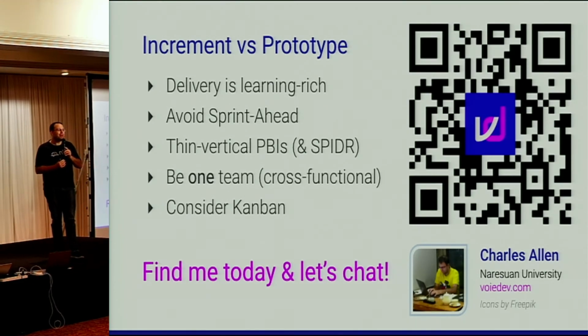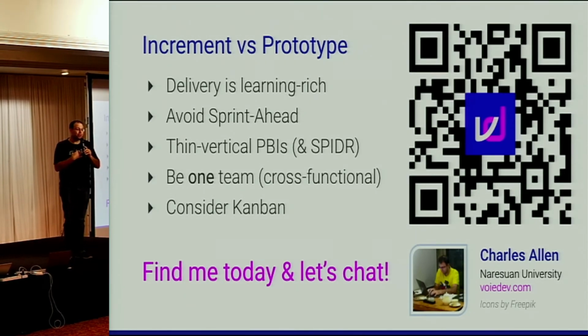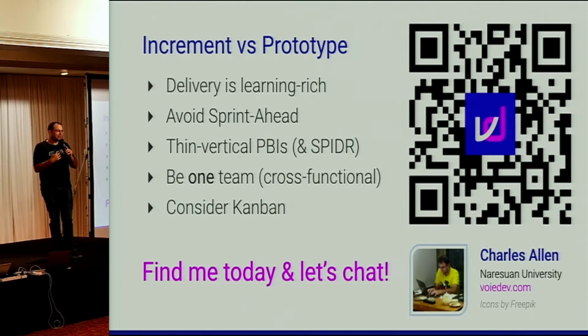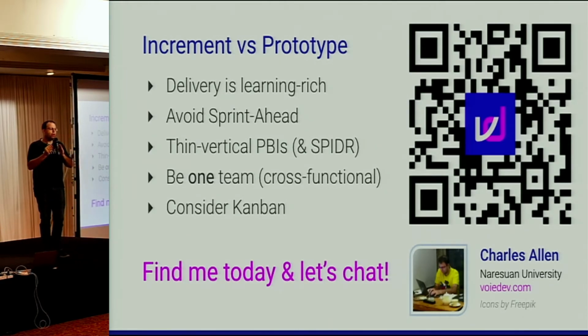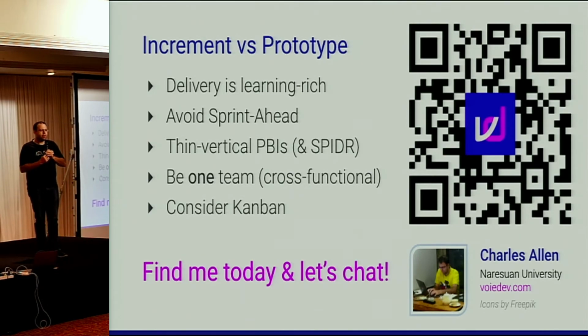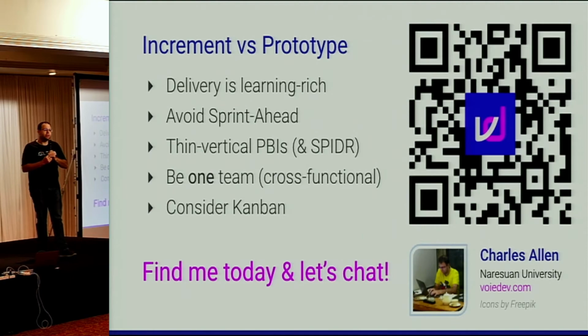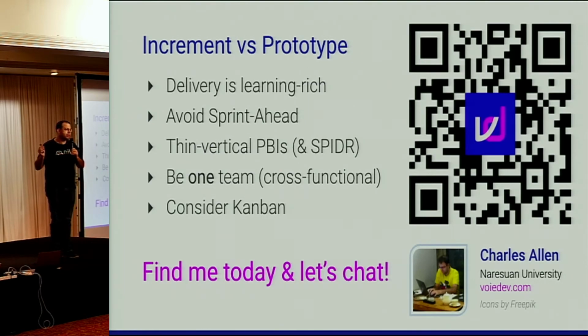So I think my main disclaimer is that I'm speaking to you from a position of working on very small teams. So my advice is clearly controversial and maybe not practical for larger teams. I think the major tool that you have is thin PBIs. The major lever you have to achieve this is make all of your features smaller. Obviously, don't just squeeze them, cut them into many pieces, right? And I think the trouble you will have there is that incremental development is very easy, very natural, but incremental design is perhaps much less natural. I'm not a designer. I should have mentioned the next talk in this room is UX in Agile. So I'm really looking forward to hearing from that, how that could work.